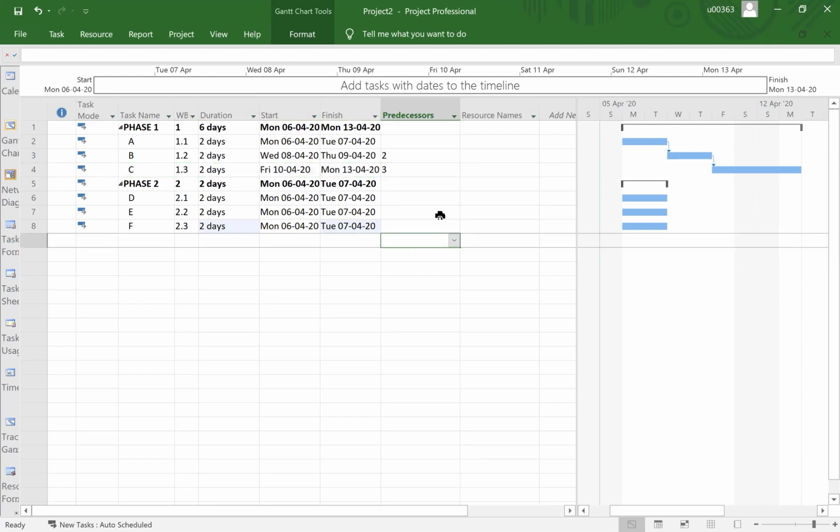Okay. And you notice that in our Microsoft Project, it basically shows the right finish to start relationship. Okay. And for activity C, you notice that it is longer. It is longer because it encroaches into the weekend. So the weekend is a holiday, whereas our activity is only 2 days. So the bar will be longer, but in terms of the real work it's the same, it's 2 days. Okay.